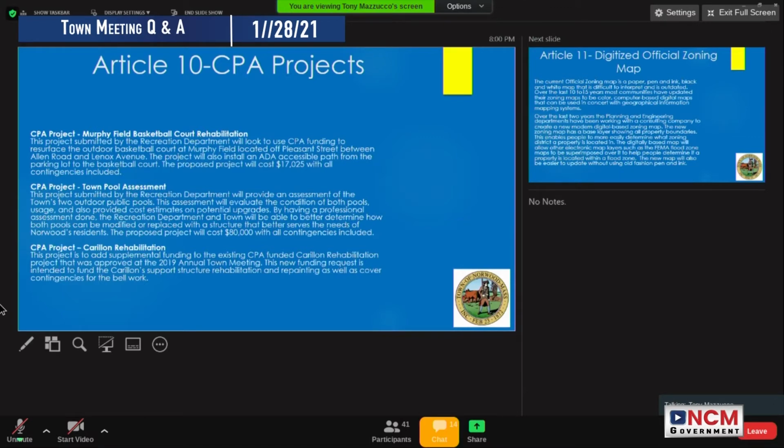Yeah, John, just to be clear, that was part of the site selection process. Remember, when you're building a new school or a new building of that size, the first process is identifying a site. So you need a certain acreage of land. That's where you start, and you say, okay, this amount of land works. We wouldn't be able to exclude it just because it happens to be adjacent to a historic property. As it gets further in the development process, that's certainly going to be part of it. But we certainly couldn't exclude the existing site saying, well, the middle school is adjacent to a historic property, therefore we can never rebuild anything on that site. Otherwise, we'd never be able to build anything anywhere.